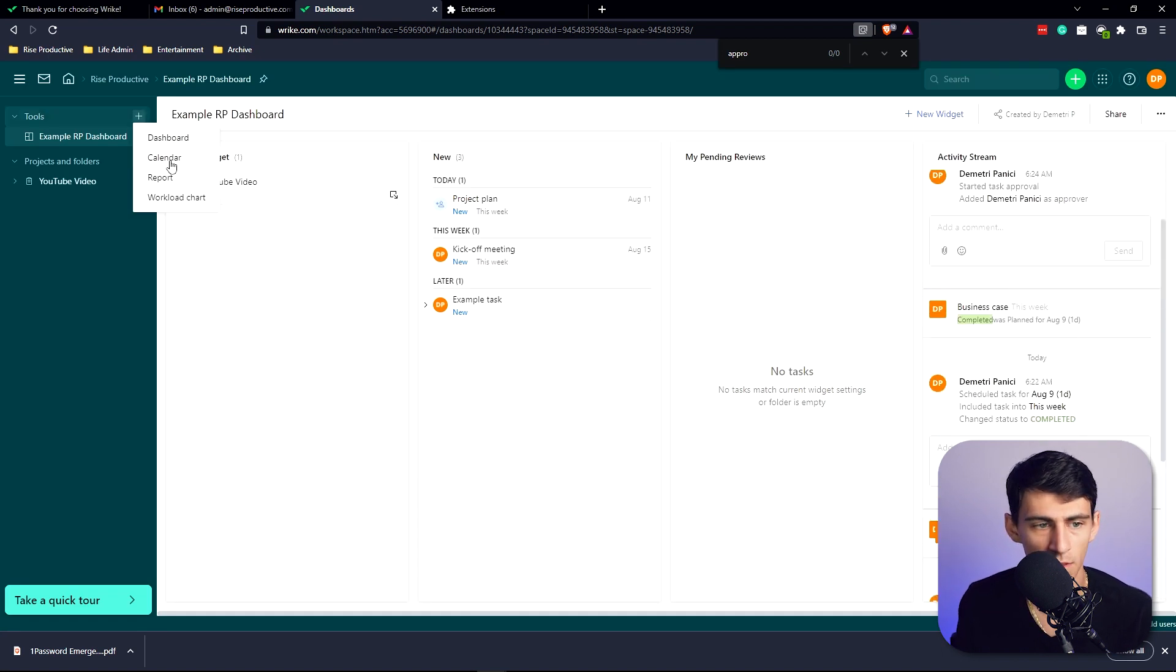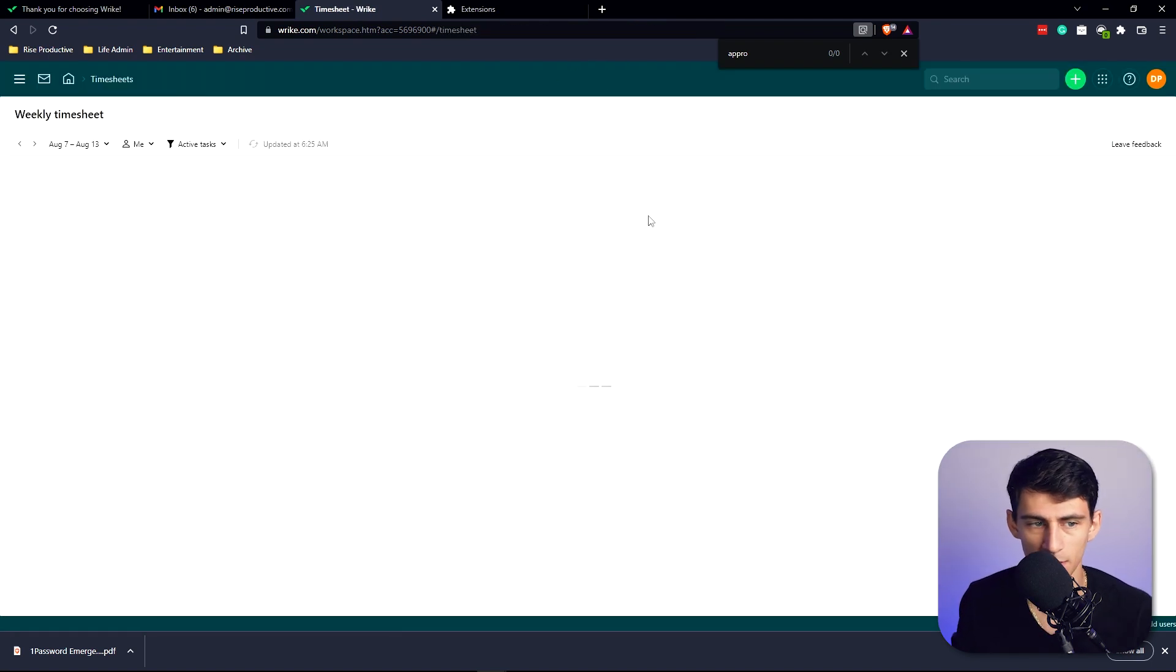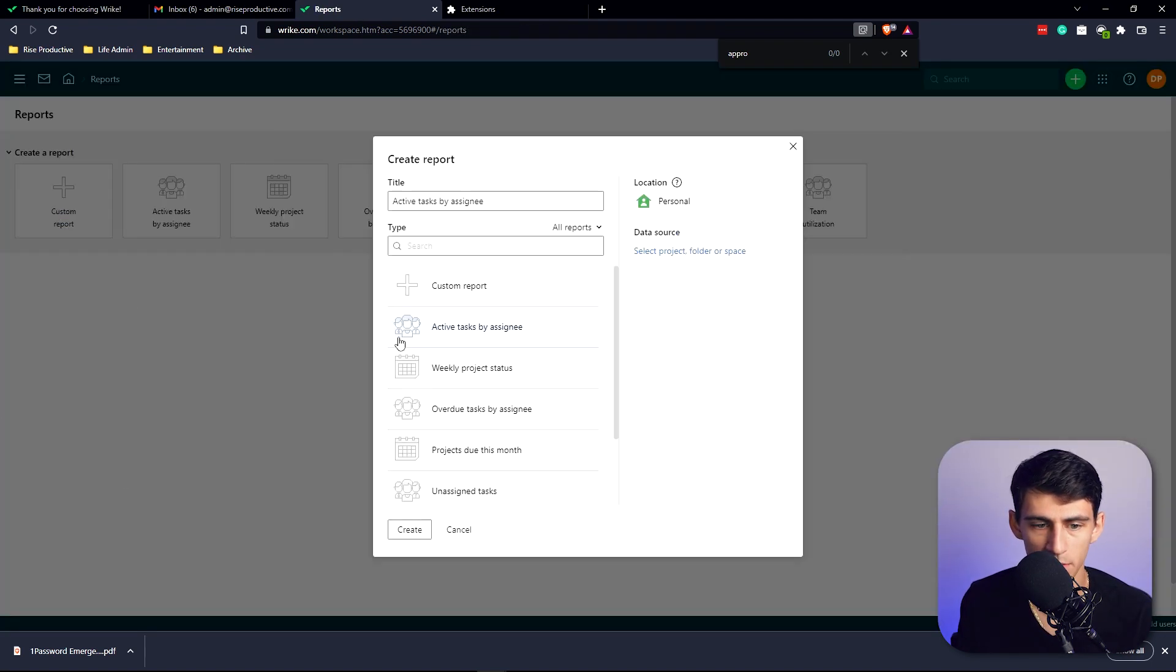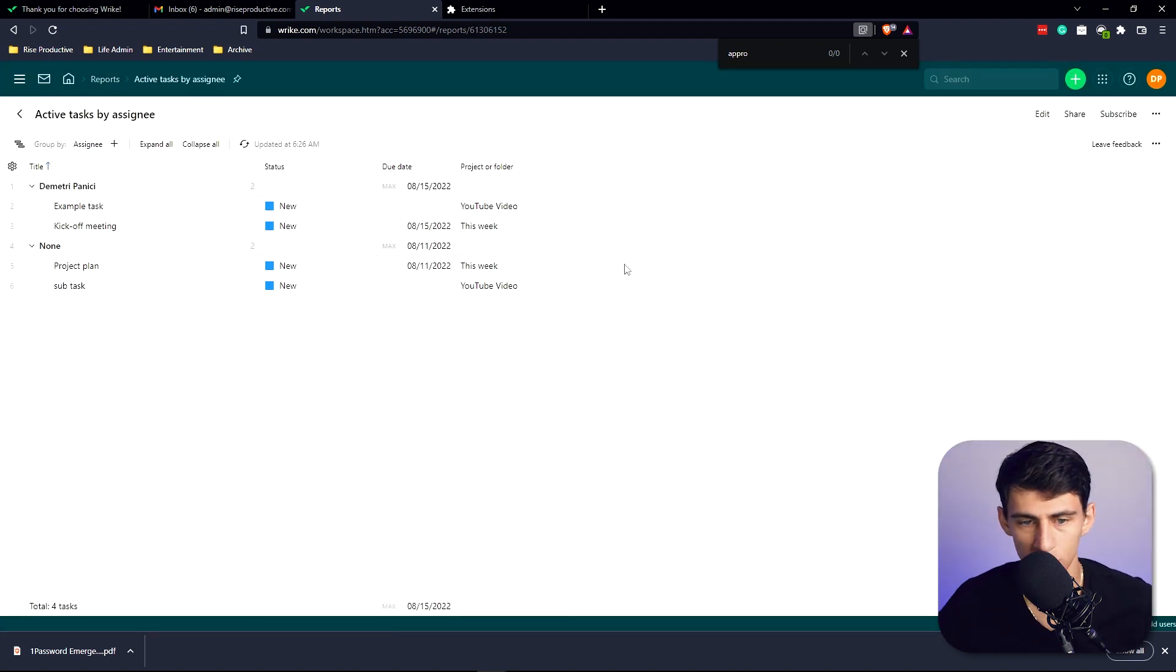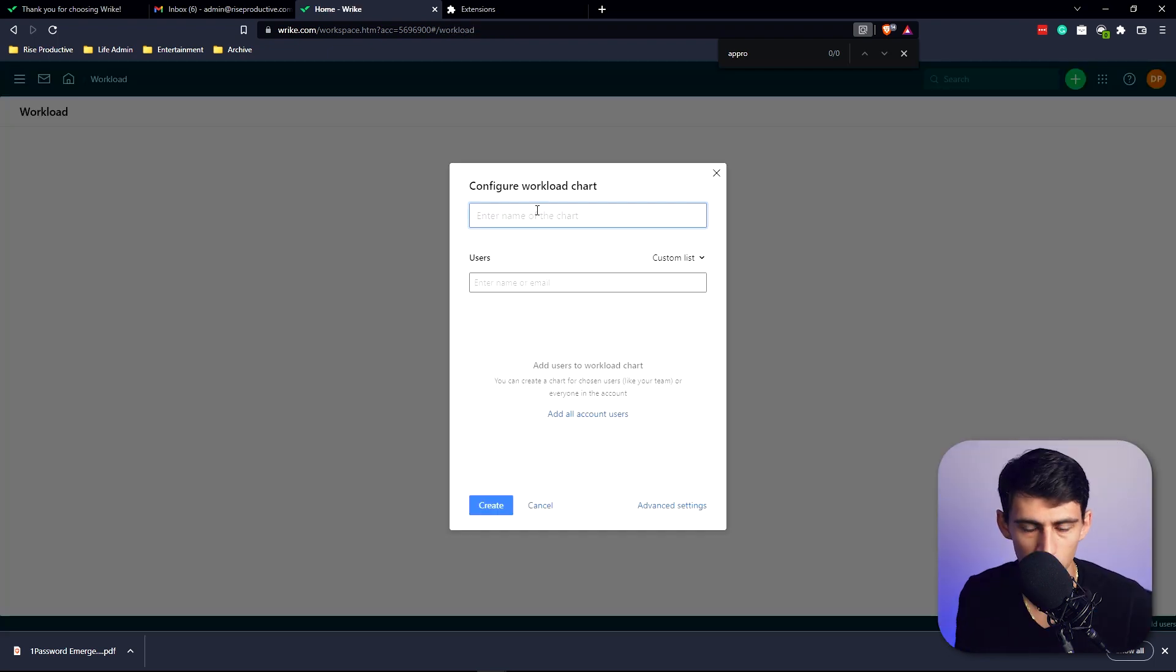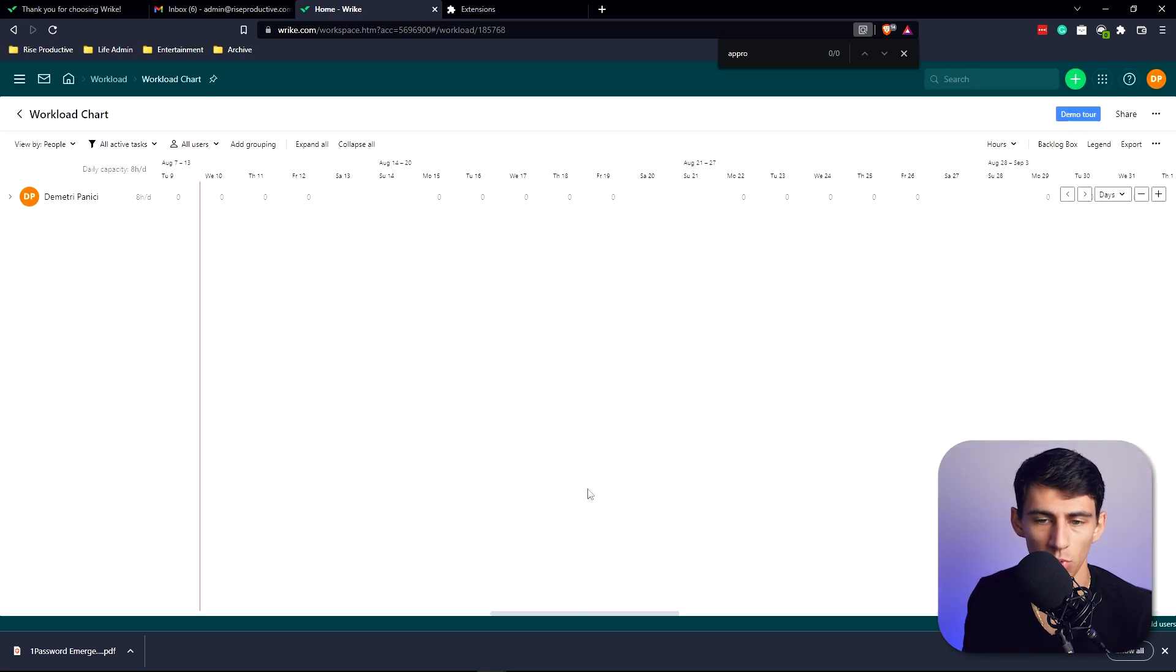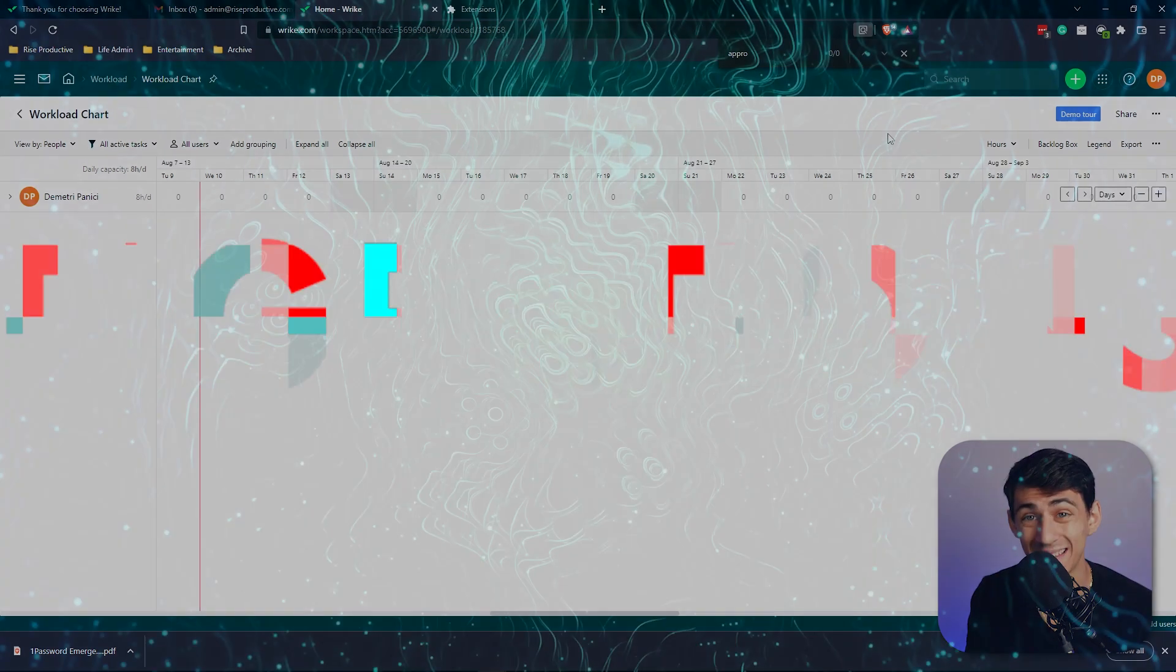Outside of dashboards, you're also able to make things like calendars. You can see timesheets here. Different custom reports can be made within here, so active tasks by assignee. Then you select the project data source. If I go YouTube, it would show that some of them are assigned to me, some are assigned to none. For companies in general, showing your workload charts is really convenient so you can see how everyone's workflow is, how many hours they're spending on their different work so they don't get overwhelmed with the quantity they have.